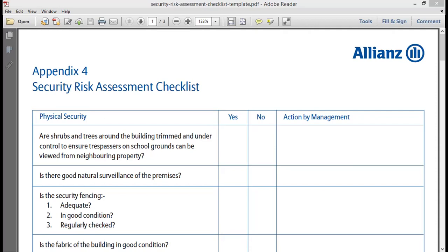So this is really just opening your mind to what you could do when compiling a checklist. And what a lot of folks do, they start off with a risk breakdown structure if it exists, and they use the lowest level of the risk breakdown structure as a checklist, okay?